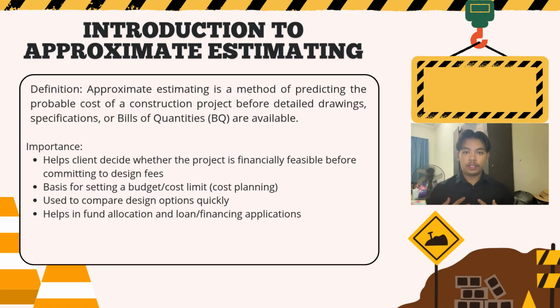And for me, why approximate estimating really matters is because at the very early stage of a project, the client needs to know roughly how much the project will cost before they even commit to paying design fees, and that's why approximate estimating gives that early figure. It is also the basis for setting a budget or cost limit, and it allows comparison between different design options, and it helps the client with things like applying for a loan or allocating funds.